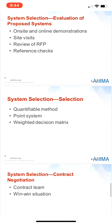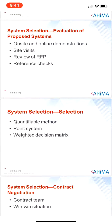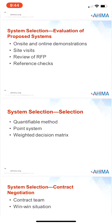Reference checks are the last component under evaluation of proposed systems. Healthcare facilities should contact several other healthcare facilities where the product is currently in use. These reference checks are a great way to learn if other facilities are satisfied with the product without the expense and time of a site visit. Best practices recommend that the evaluating project team contact healthcare facilities from the vendor's reference list as well as healthcare facilities that are clients of the vendor but not included on the reference list.